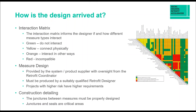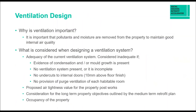Within the design, the measure design can often be provided by a product or system supplier, but with oversight from the retrofit coordinator. It must still be produced by a suitably qualified designer overall, and higher-risk projects carry higher requirements for that designer. One key element that must always be included is construction detailing — particularly the junctions between measures. These must be properly designed and considered, as junctions and seals are critical to achieving air tightness values and mitigating risk of condensation, damp, or mould at those junctures.